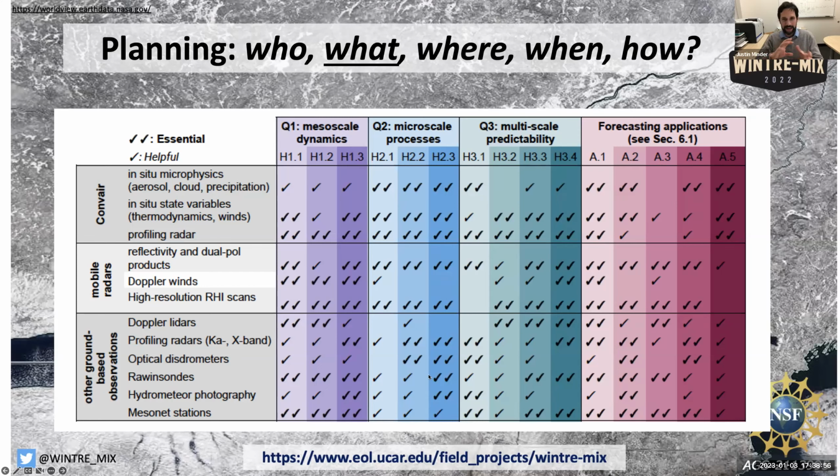This kind of matrix is a useful way to make sure that you're covering your bases and you have adequate data to address your hypotheses, but also that you're not putting out expensive instruments that don't really add to addressing your questions and hypotheses.